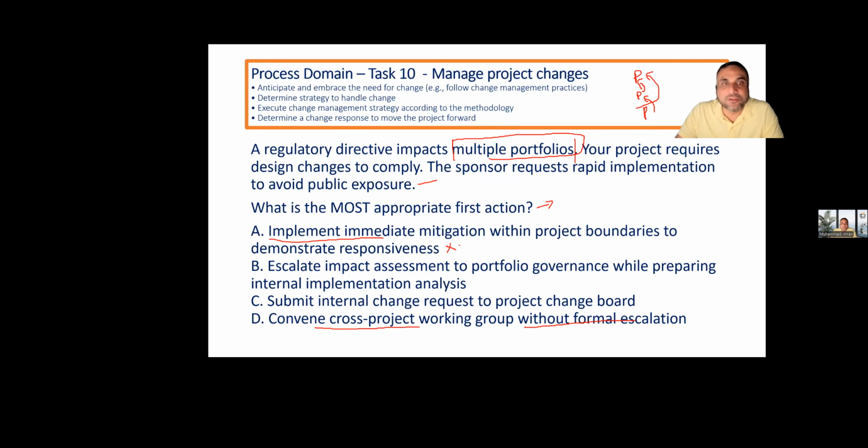change board. There is nothing called a project change board. We have the change control board. Please be very specific with the words. Sometimes they use words which are similar to the real words, but they are not the actual words. So they are made up words. We know there is something called a change control board at project level, a steering committee at program level, and a governance board at portfolio level.